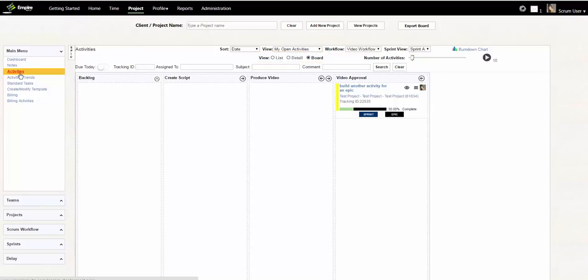The current Scrum Board view shows activity in the backlog. The backlog is a storage container for any idea activity that users or team members want to work on. As various steps of the activity are completed, users can drag and drop the activity to different steps so that they can keep track of its progress.